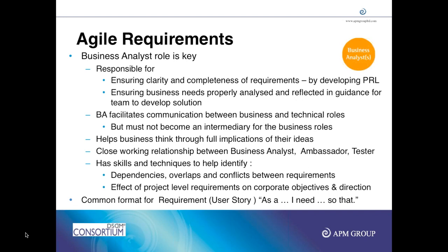So this is another activity which we can do using facilitated workshops and involving the business visionary and the stakeholders. We put some business value or a MoSCoW to it, and we rank the requirements, and then we sort it again. So now what you see is an ordered list of requirements. At the time of foundations, we agree all the high level requirements, and we also agree the priorities of those requirements thought about at that time.